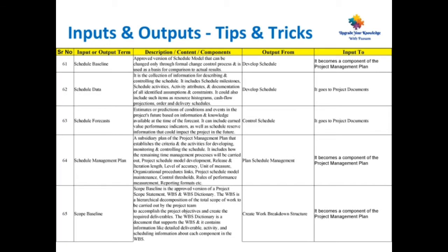Coming to point number 61, schedule baseline. Approved version of the schedule model that can be changed only through formal change control process and is used as a basis for comparison to actual results. It is output from develop schedule and input to project management plan.